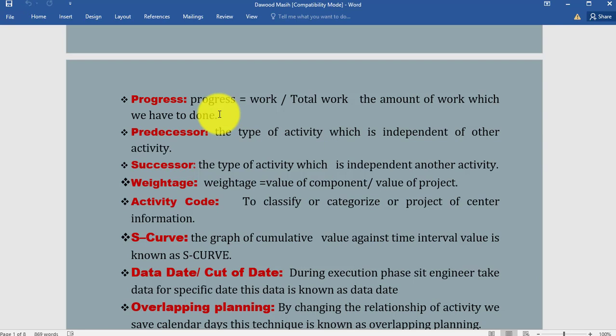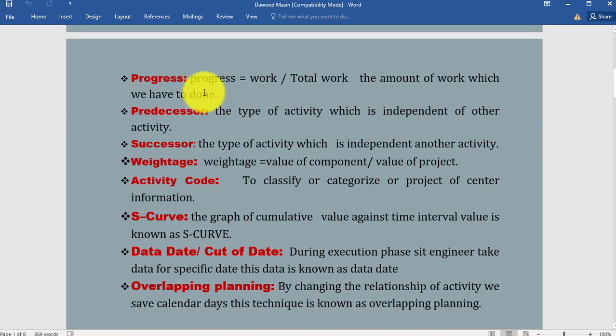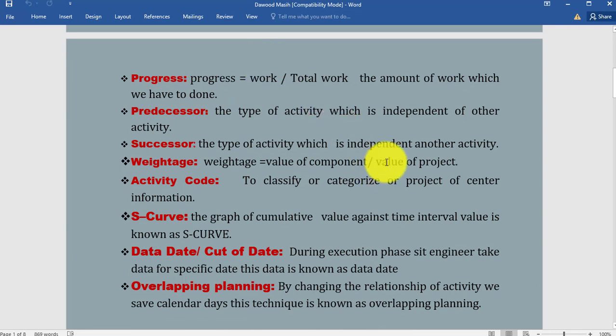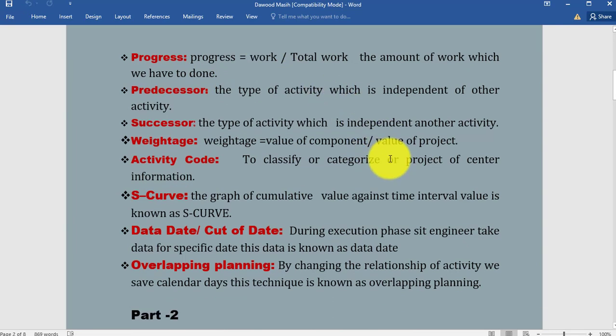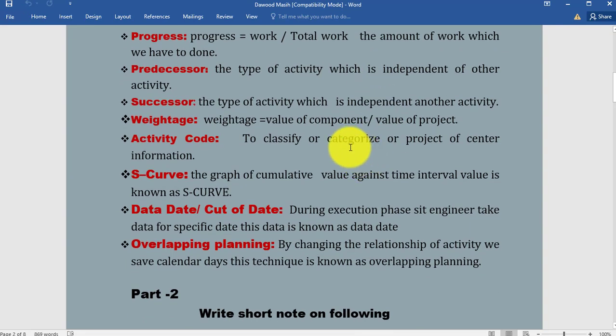Until the wall work doesn't start, we are not able to make the roof of our house. What is weightage? It is equal to value of component divided by value of project. In our execution phase we have used this formula many times. Activity codes: to classify or categorize our project or center information.